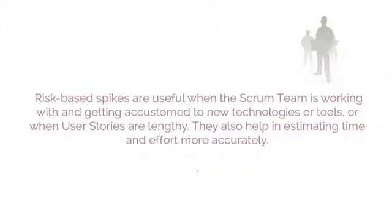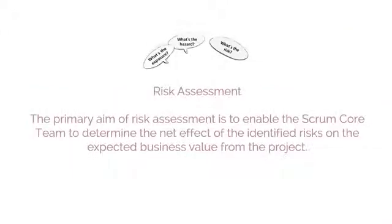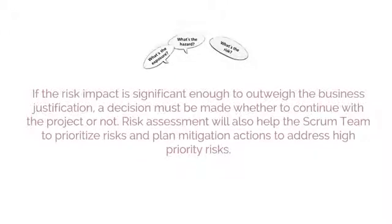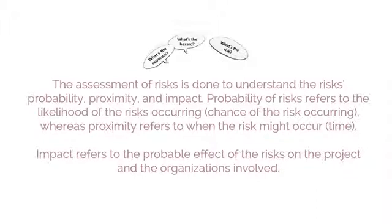The next step in the Risk Management Procedure is Risk Assessment. The primary aim of risk assessment is to enable the Scrum Core team to determine the net effect of the identified risks on the expected business value from the project. If the risk impact is significant enough to outweigh the business justification, a decision must be made whether to continue with the project or not. Risk assessment also helps the Scrum team to prioritize risks and plan mitigation actions. The assessment of risks is done to understand the risk's probability, proximity, and impact. Probability refers to the likelihood of a risk occurring; proximity refers to when the risk might occur; and impact refers to the probable effect on the project and organizations involved.